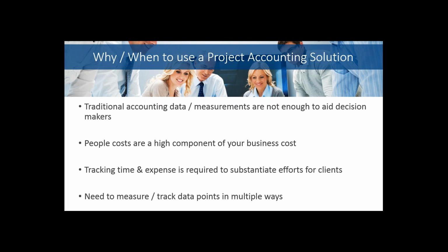Or, if tracking time and expense is required to substantiate the efforts for your clients, you may need a project accounting solution. In this example, if you're charging a client $5,000, and the client asks you to support that, telling them that employee A spent 30 hours developing this program for them is your support. That's part of the functionality that a project accounting system can give you.